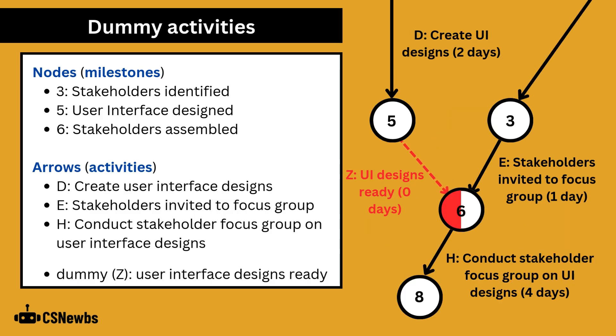Representing a task that doesn't require any additional work but indicates that milestone 5 must be reached before the activity H from 6 to 8 can begin.